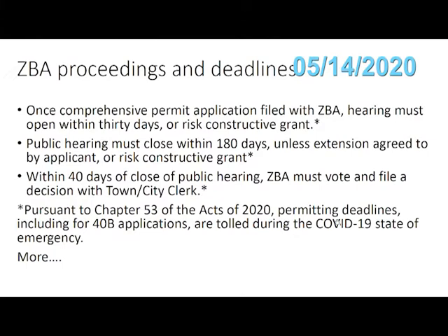Now, once an applicant receives the project eligibility letter, they can now apply to the Board of Appeals. So here's where the local regulations come into play. When I apply for a permit in West Newbury or anywhere, I'm following the rules that the Planning Board or the Board of Appeals or the Board of Selectmen have established. And here, those rules are really important. Both procedurally, how many copies of the plans need to be filed, what scale should the plans be drawn at, but more substantively, what does West Newbury care about in terms of design, in terms of spacing, in terms of landscape, in terms of architectural design, in terms of historic preservation, in terms of preservation of views and vistas for the river, for example.